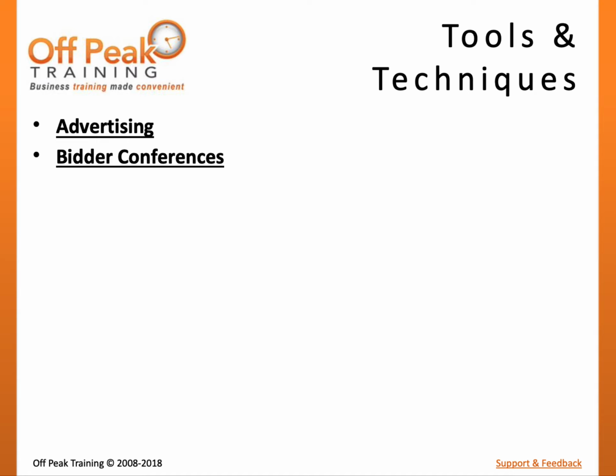After creating awareness of the need, the project team should begin to receive seller proposals as input to this process. There are several tools and techniques related to the selection of sellers. Independent estimates is a cost or time estimate prepared by the performing organization or a third party to serve as a baseline for comparing seller quotes. A large deviation from this baseline may be regarded as a warning sign that the seller is not a good match.